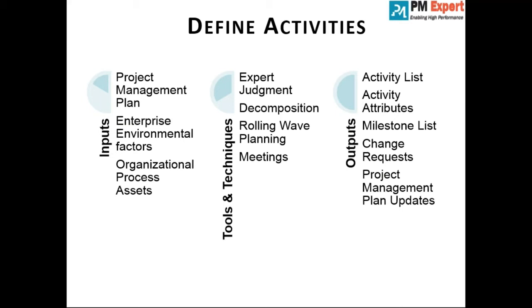Are you getting the point, Pankaj? When I am planning, like when I'm using rolling wave planning, I am following iteration and adaptation. Based on the uncertainty, my planning horizon can be short or long. If the visibility is very good, my planning horizon was 10 kilometers. Then it was foggy, so my planning horizon will be only 5 kilometers, because further than that I don't know.